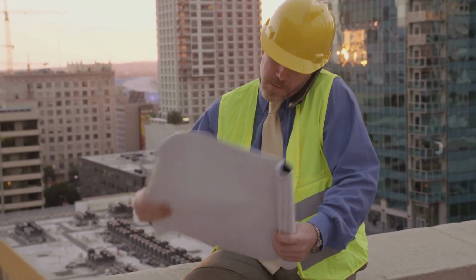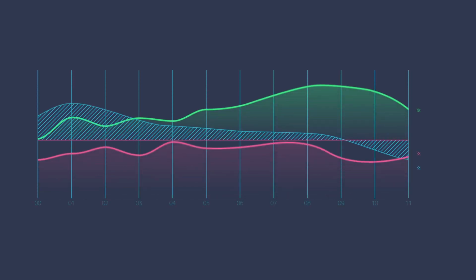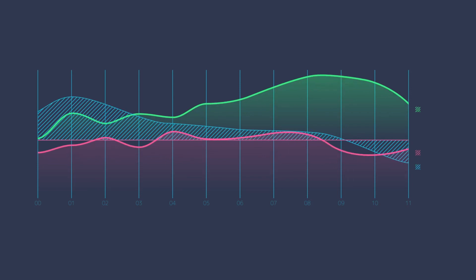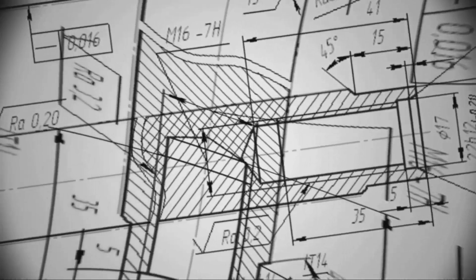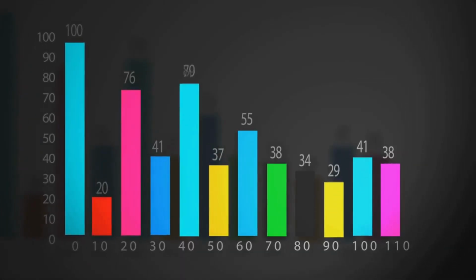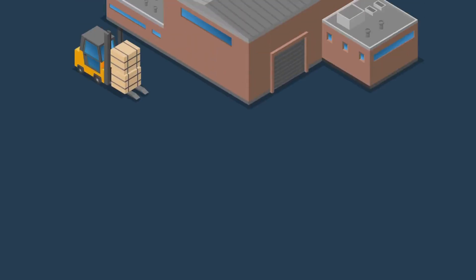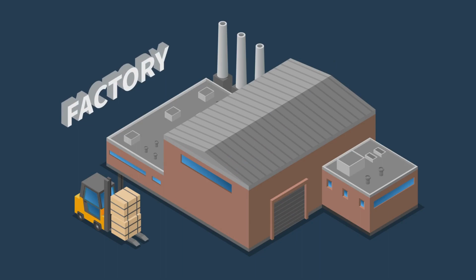We explored the elements that make up a fenced bar chart. We saw that it's more than just a collection of bars and arrows. Each bar represents an activity, a task that needs to be accomplished. The length of the bar corresponds to the duration of the task, and its position on the chart indicates its planned start and finish dates. The fences, or the vertical lines, group related activities together, giving us a clear picture of the project's workflow.